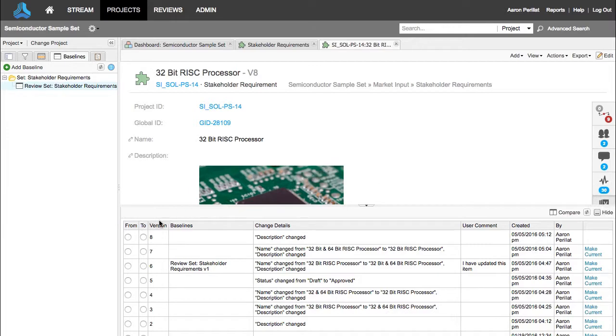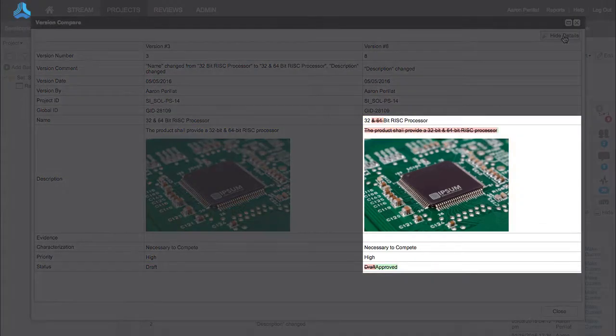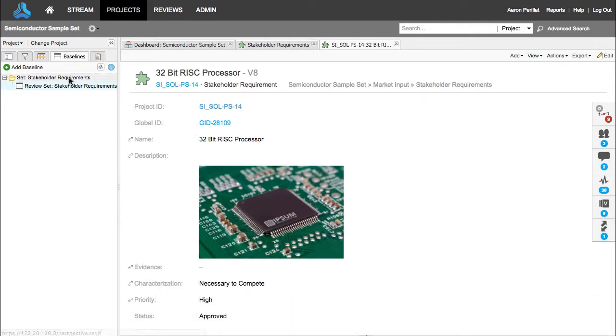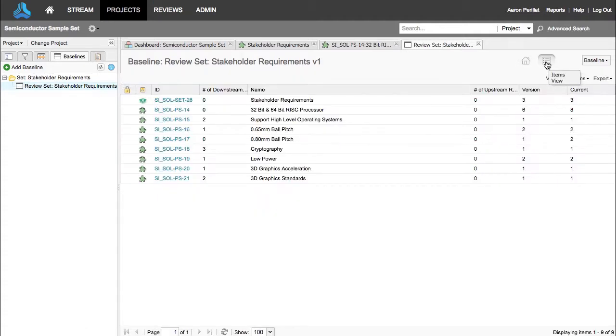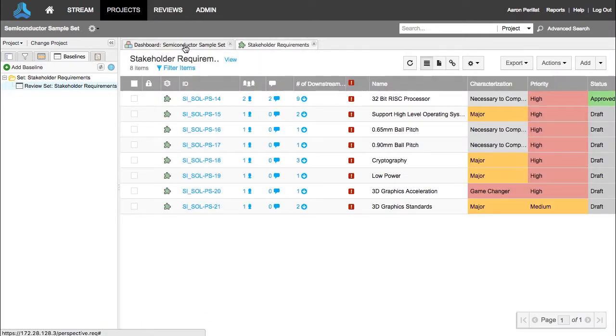If they have a question about why something was changed, the versioning information directs them to the right person to talk to and shows them the change that was made. At the macro level, you can then start to take baselines representing a snapshot of either the entire project or a particular component, which in turn allows you to compare or run reports giving you insight into what has changed over time. This gives you a great amount of capability to control the change management process in complex SoC design.